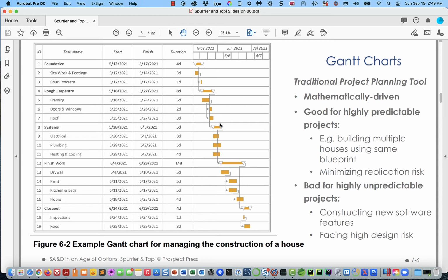The more detailed project planning approaches have had that concept in them from the get-go. Likewise, you don't have to say that you have to start activity B exactly at the end of activity A. You can say, I'm going to wait 5 days, and that's called a lag time instead of a lead time. So it's always been possible in these project planning applications to express relationships between activities in a more flexible way than they're showing here.